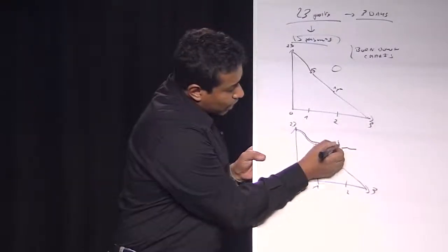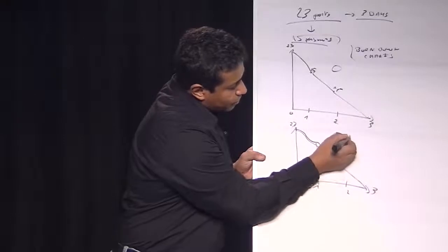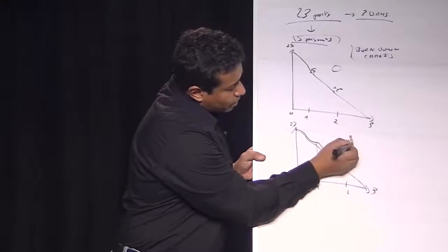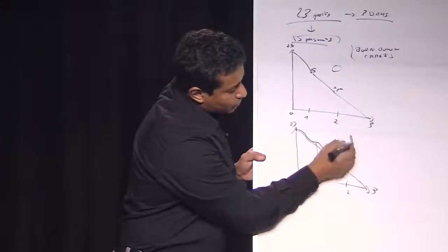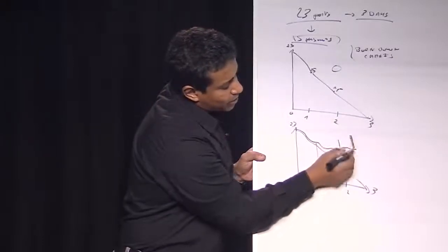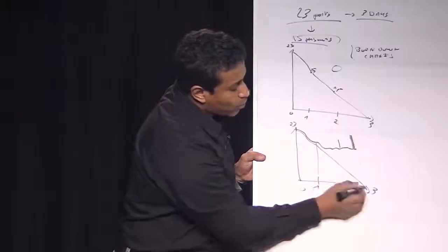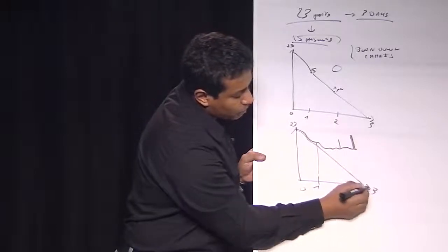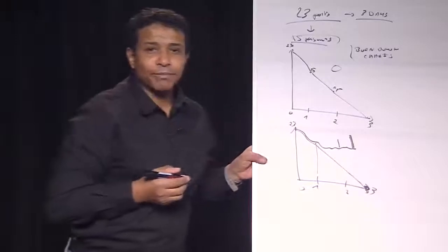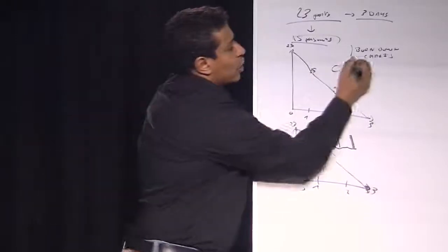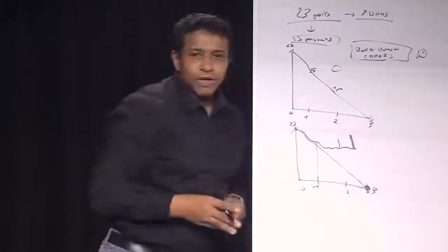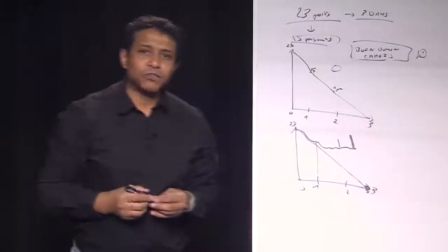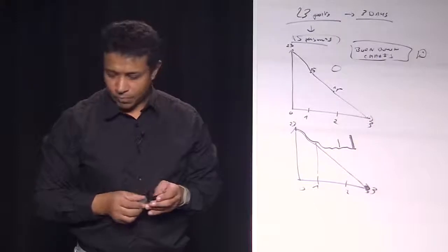So here there is a crash down. I can raise an alert as a dev first and as Scrum Master after to say, okay, we won't be able to deliver on time. This burn down chart is a major key to manage your project and to make it understandable.